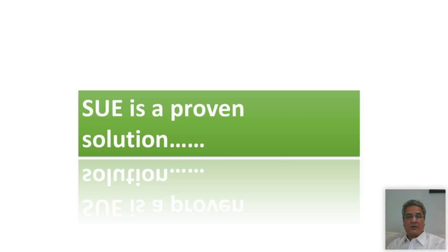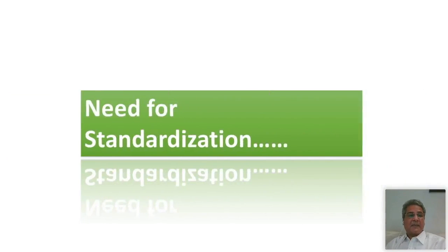They have all these. The entire concept of SUE started in the highway industry of United States, because when they were starting with their work, they realized that underground utility information available was not adequate to get into construction. Ultimately, they introduced the concept of SUE, and the average is that the return on investment is $14 for every dollar spent on SUE. $14 for every dollar spent. And most of them say that it's beyond just the dollar saved. It's also about keeping our projects on schedule, finishing our projects on time.